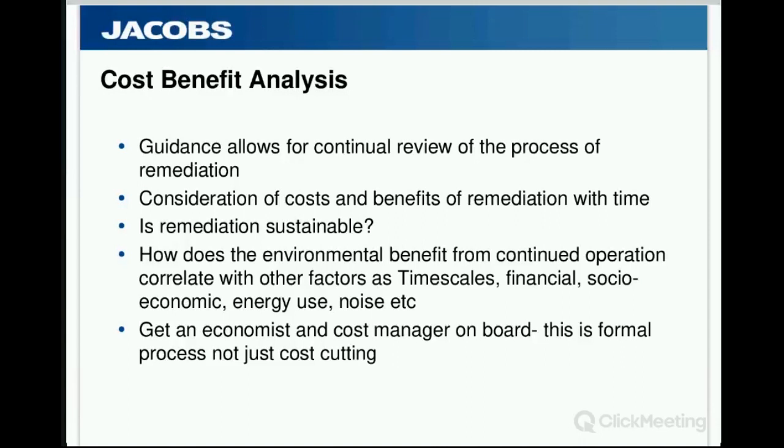Often the environmental assessment, the risk assessment and the CSM are king, and it's obvious that some remediation is required. However, if those costs become prohibitive, several millions, then model procedures and UK guidance does allow a cost-benefit analysis. Often, for example, deep groundwater remediation is not feasible, or the activities will have to continue indefinitely. This will have a high capital and operational cost over time, for the duration and longevity of the project, perhaps decades. So sustainable remediation and cost-benefit analysis are linked, as the costs and the benefits can be converted into monetary value for comparison.